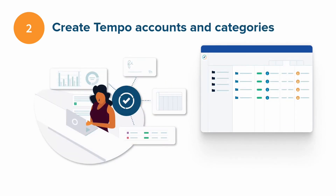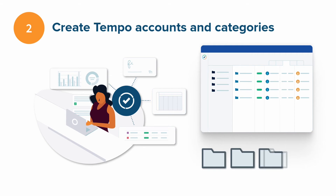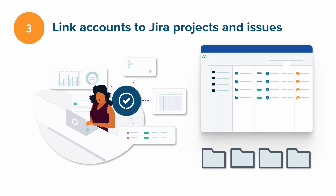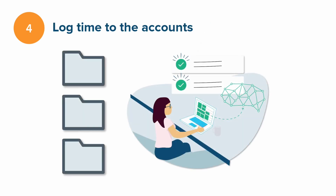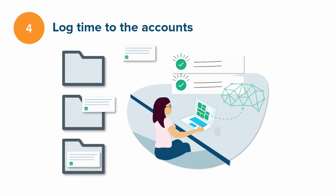Next, the Tempo account administrators create Tempo accounts for different purposes, such as billing, CAPEX and OPEX, cost centers, or internal, and they set them up properly for your company. This includes linking the accounts to related Jira projects and selecting the correct account for the project's issues, which lets employees log their time to the correct account on these issues in the Jira projects.